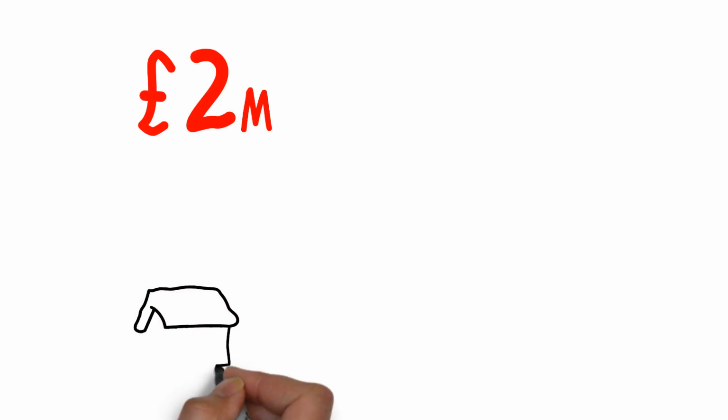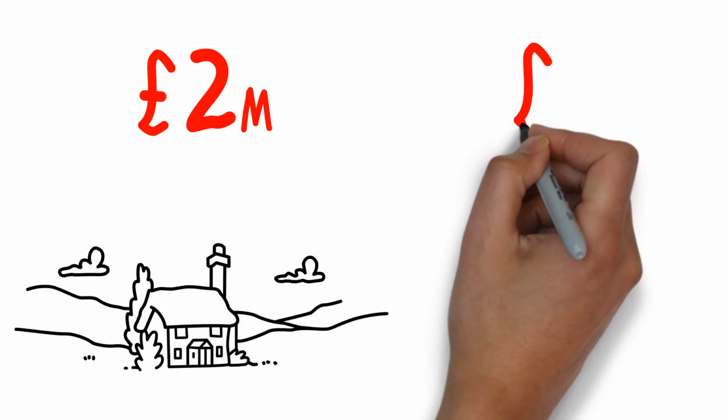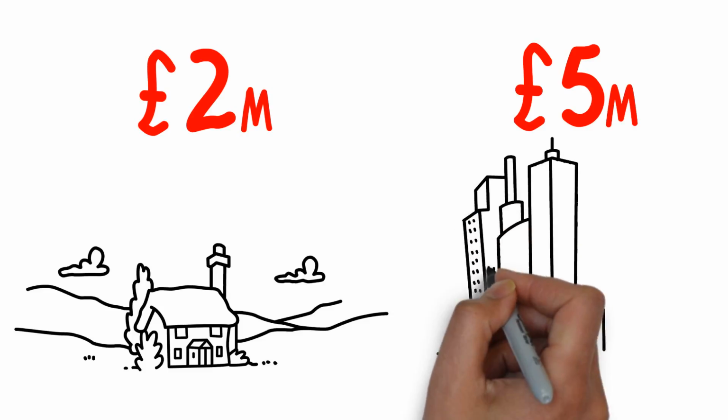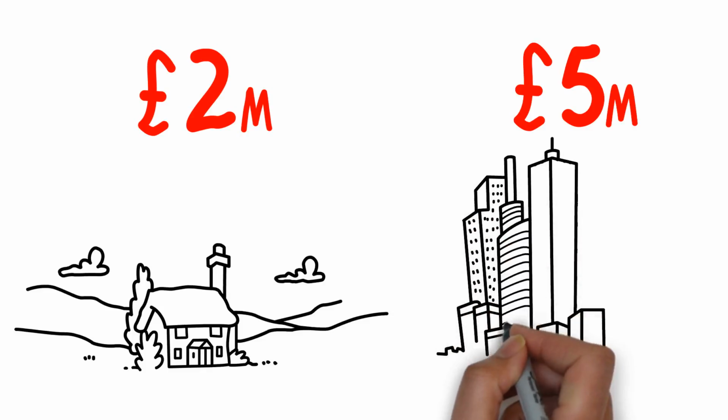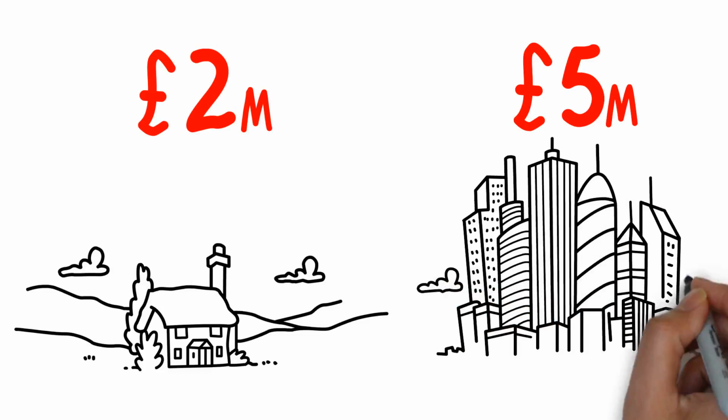Property owner's liability normally limits at £2 million for rural projects and £5 million with urban projects. It stands to reason that the opportunity for claims is increased when your project is surrounded by more people, so the indemnity limits should be higher.